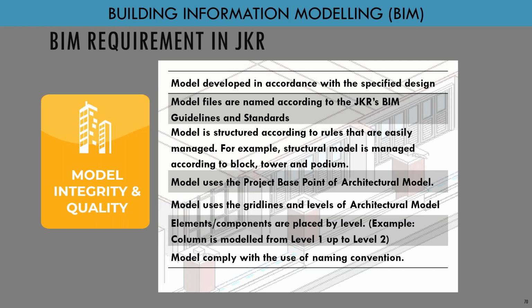And then the third one is the model is structured according to rules that are easily managed. For example, the structure model is managed according to the block, tower, and podium. If you have a massive, very complicated, very complex design, you can separate the model.